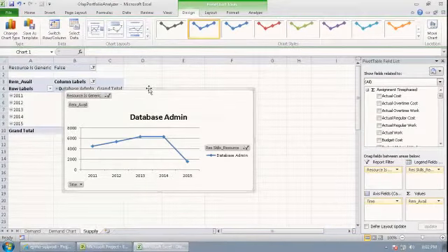And if I wanted to take this, put it onto a separate worksheet, I could. Ultimately, I want to lay these on top of each other, though. So I can then filter and say, okay, show me one particular skill or one particular role. Show me the demand, show me the supply, and I can see where they're above and below each other to see where the shortages and overages are.